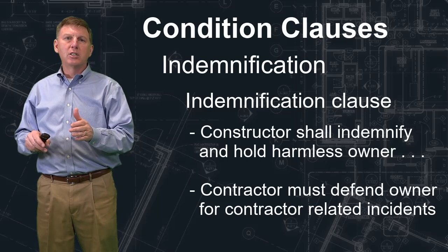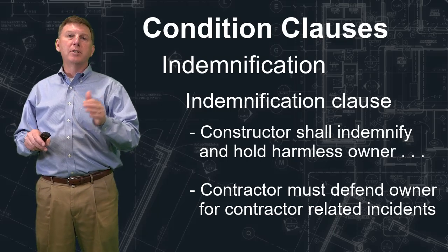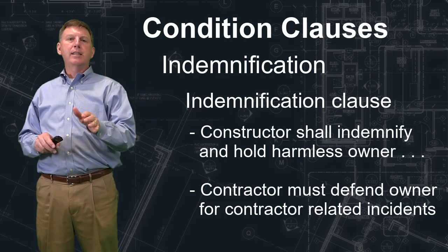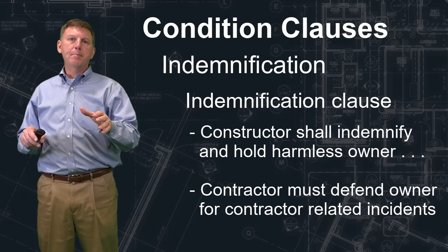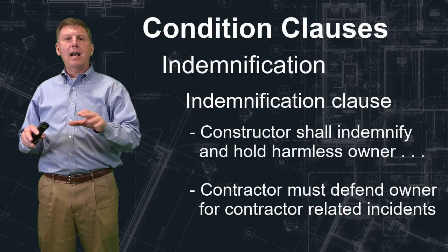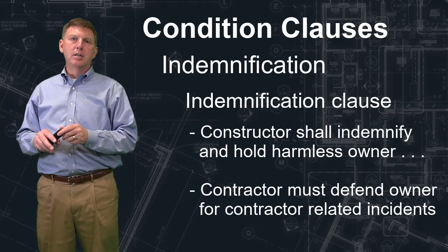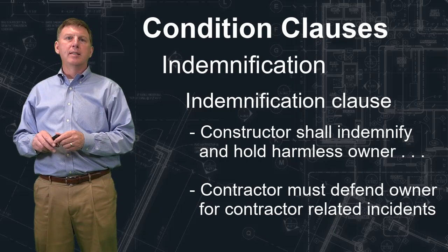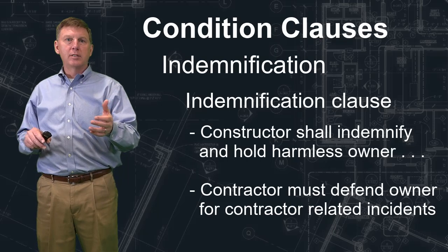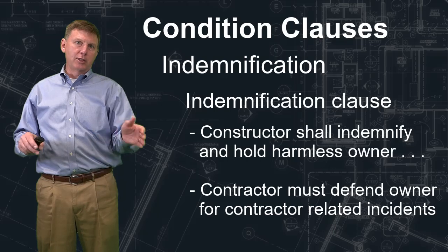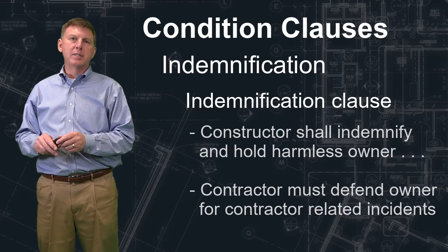Your indemnification clause says that you're going to protect the owner in case of that lawsuit. Now you got to read these carefully. I actually had a situation one time that said we're going to indemnify the owner for acts of their people. So let's say they had an inspector show up to the job site one day and the inspector hit another car and then the owner got sued. They wanted us to cover that liability as well. Of course, they didn't agree to it and they had to strike it from the contract before we would sign.